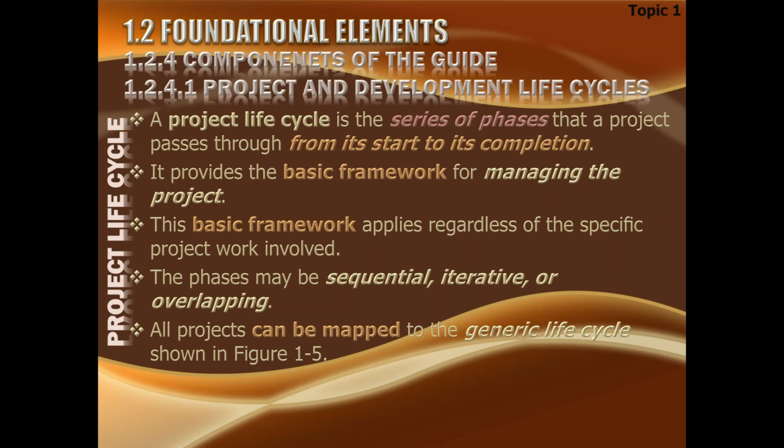So we just took an example of the construction of a simple house, and we could easily divide it into 5 phases, and every phase is independent of the other phase. Once one phase is complete, only then the second phase can start. Once that is complete, only then the third phase can start. This is the ideal way of doing it.